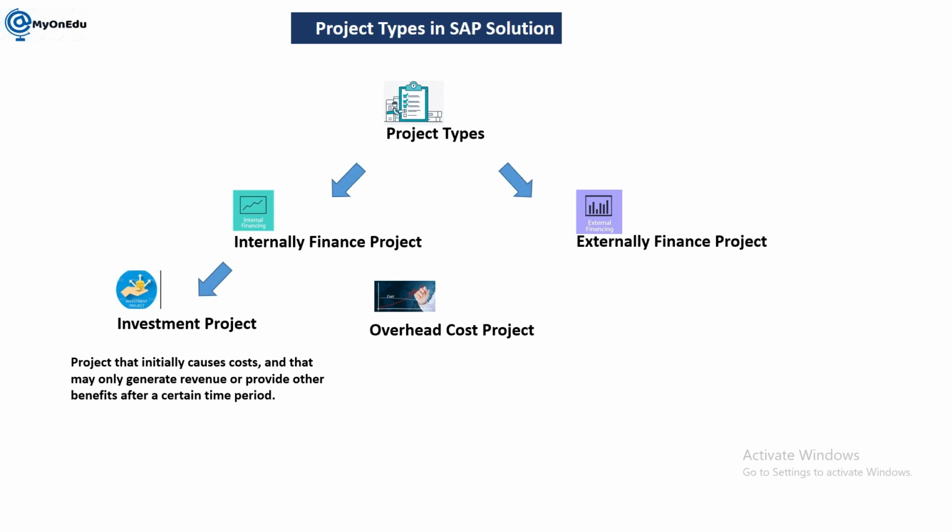Okay, so we are calling it ROI. When we are understanding whether this project will be successful or not, it is based on some factors: you will calculate the NPV, you will calculate the payback period, you will do complete pre-investment analysis, ROI, and only then you will say, yes, this project is useful for us. In this kind of project, you will not have any customer, no initial revenue, and here periodic capitalization. So in finance terms, whatever amount we are going to put into the project has to be considered as an AUC, asset under construction.